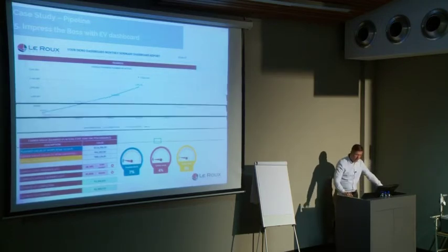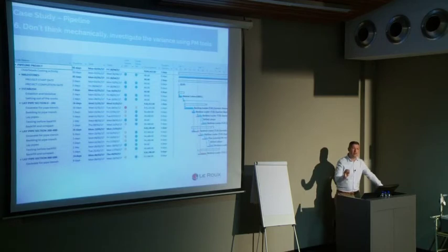And when I go back to my schedule, I've got all the information to pinpoint why there is a problem. Going back to the resources, it's quite easy to find that resource, but complex to explain, because I'll have to open up those columns. But you can just do some filters and check where you find this cost variance, what is the common resource that's causing this, and you'll find out that it's the TLB. So the TLB is costing more.